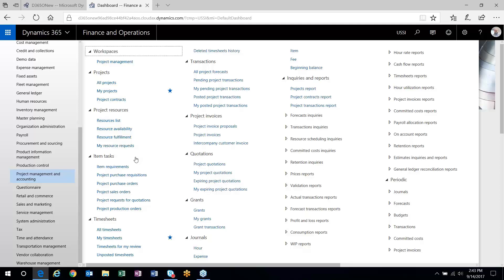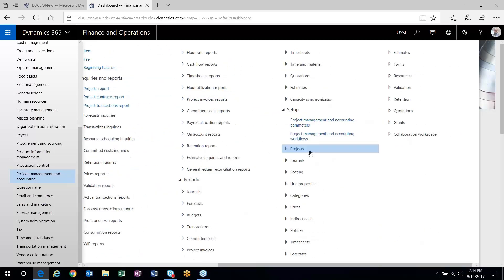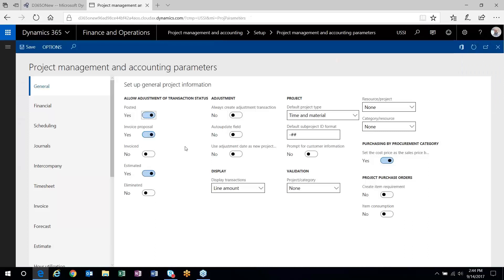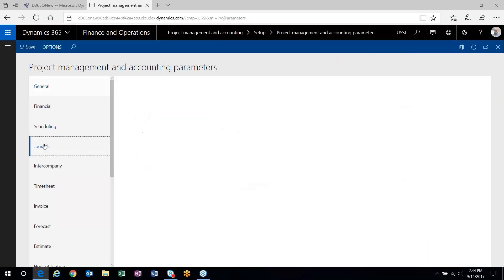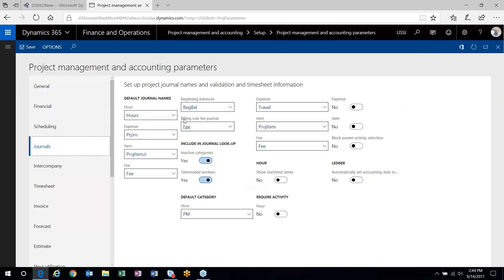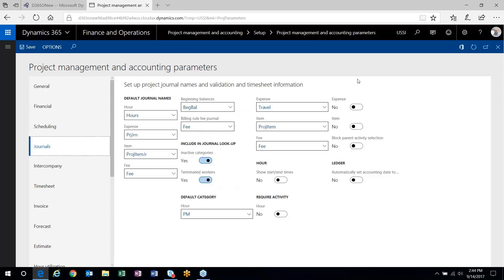What the billing rules give you are another set of tools to create more flexibility in what gets billed and how you bill the end customer. Before I start, I'll point out one parameter setting that needs to be set up: in order to use billing rules, outside of your standard category setup, you'll need a journal specified for the billing rule fee journal. That fee journal is used behind the scenes to post fee transactions during billing rule invoicing.